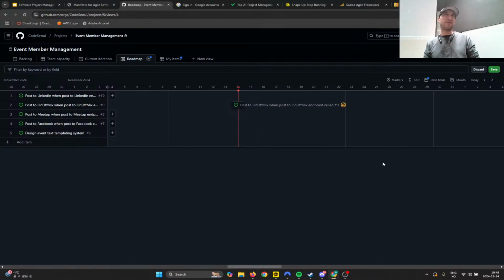But I also haven't had a whole lot of success with that because people's velocity is not as consistent. Velocity is the number of story points completed per sprint. Their velocity is not always as consistent as you would expect. I was just about to say, oh, that sounds less stressful, but the stress element's removed. I only have 3 days to do this one task because that's what I said I'm going to do it in. And then it's like, oh, it's 3 points.